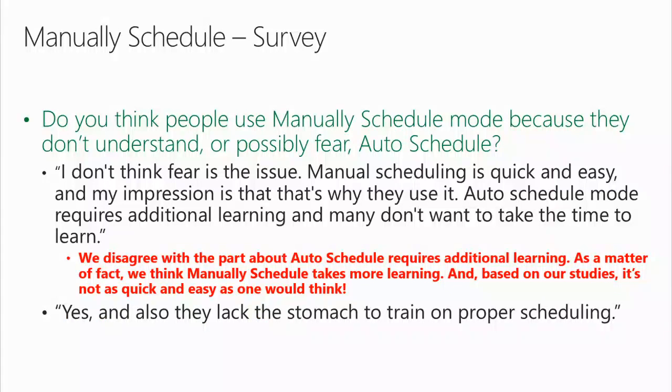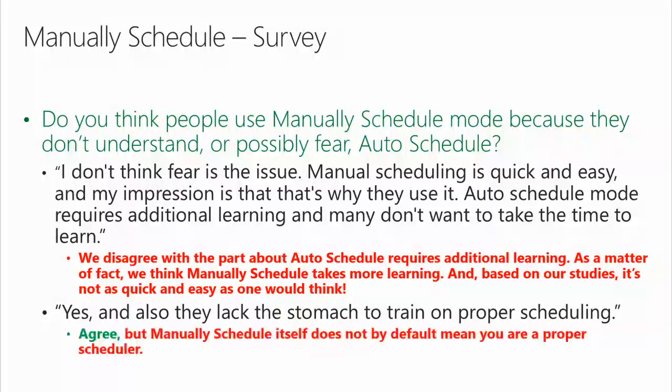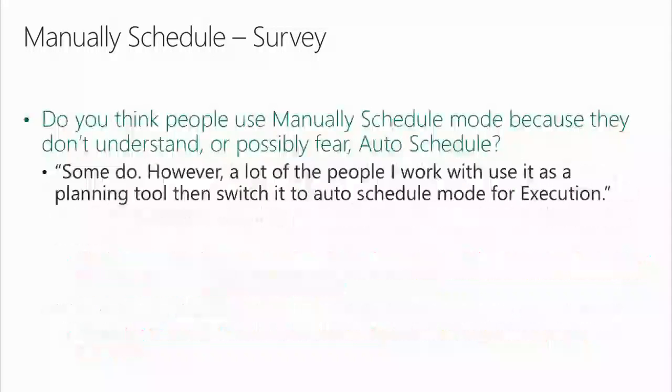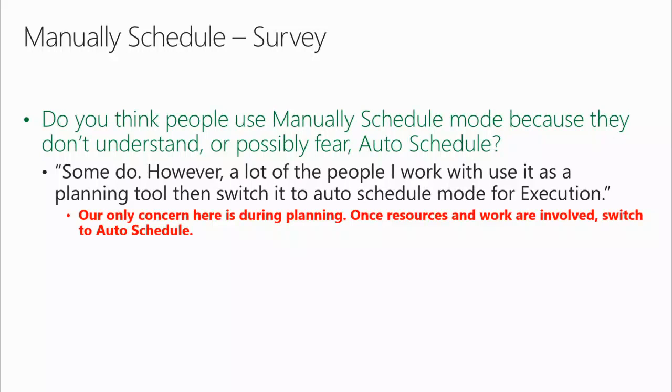"Yes, and also they lack the stomach to train on proper scheduling." Agree, but manually scheduled itself does not by default mean you're a proper scheduler. And then somebody said some do. "However, a lot of people I work with use it as a planning tool, then switch it to auto-schedule mode for execution." Our only concern here is during planning. Once resources and work are involved, switch to auto-schedule. Get away.